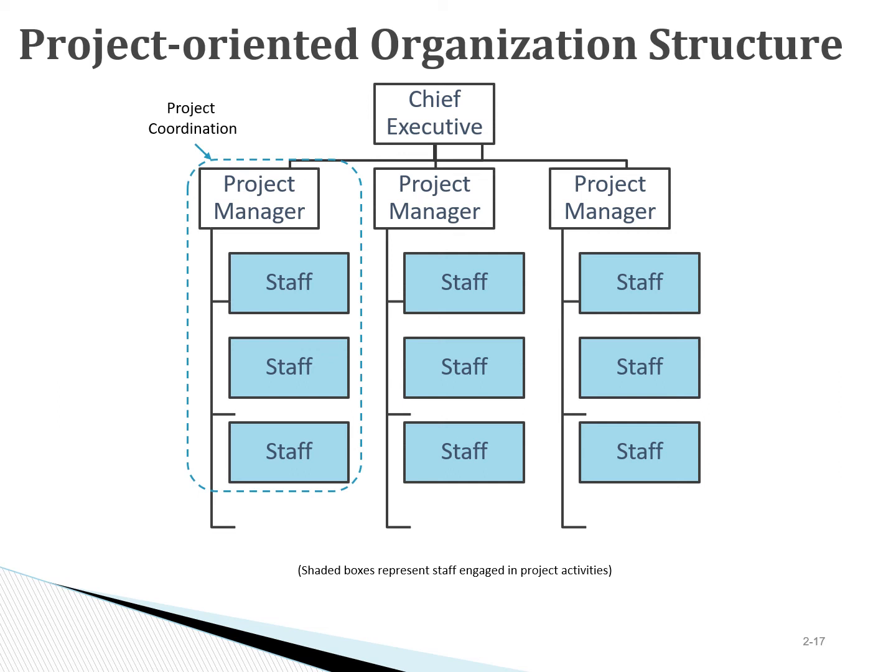On the other end of this spectrum, a very effective or project-oriented organization is basically organized based on projects. So as projects are formed, project managers are designated, and the staff that get assigned to the project report directly to the project manager.